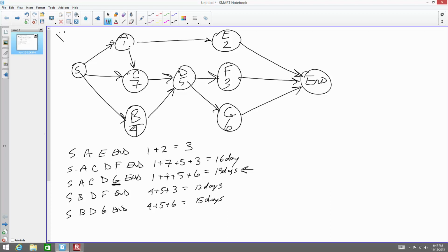So design and build is on the contractor. It's their responsibility. The contractor is the designer and the builder. A lot of times, what that really ends up being is that there's an engineering firm working with the contractor as a team, making the design build team.